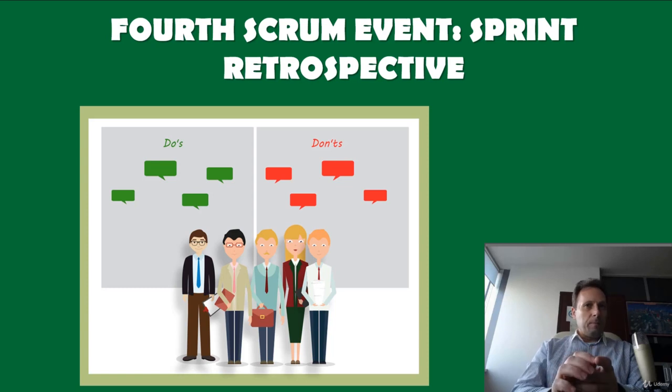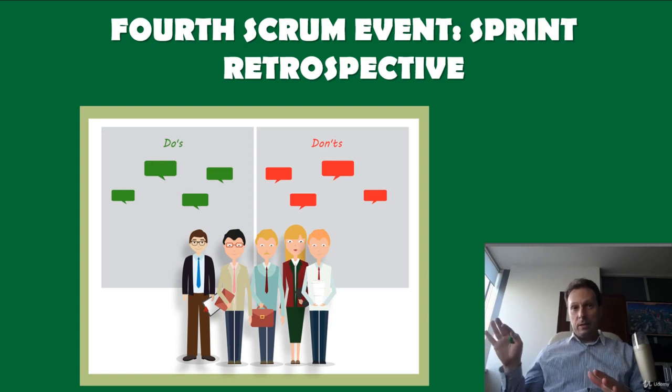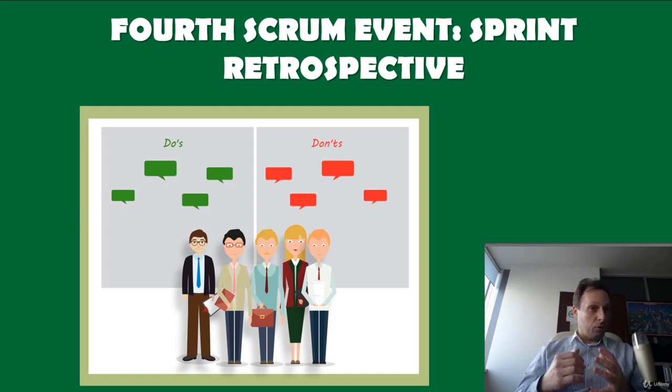A sprint retrospective meeting is to find what activities the team is doing well, what activities should be continued, and what more can be done to improve the next sprint to be more enjoyable or productive. The sprint retrospective, the last ceremony in the sprint, takes place after the sprint review and before the next sprint planning. The meeting should be time-boxed to no more than an hour per week of a sprint plan. The Scrum Master facilitates the meeting to keep it on track, focused, and within the time box.